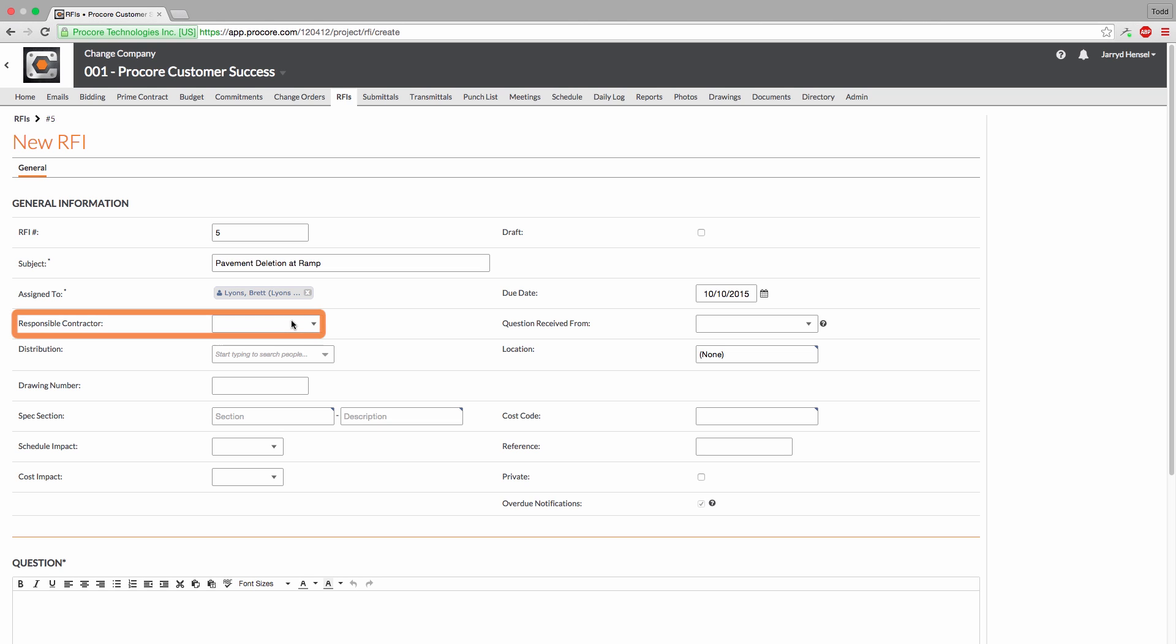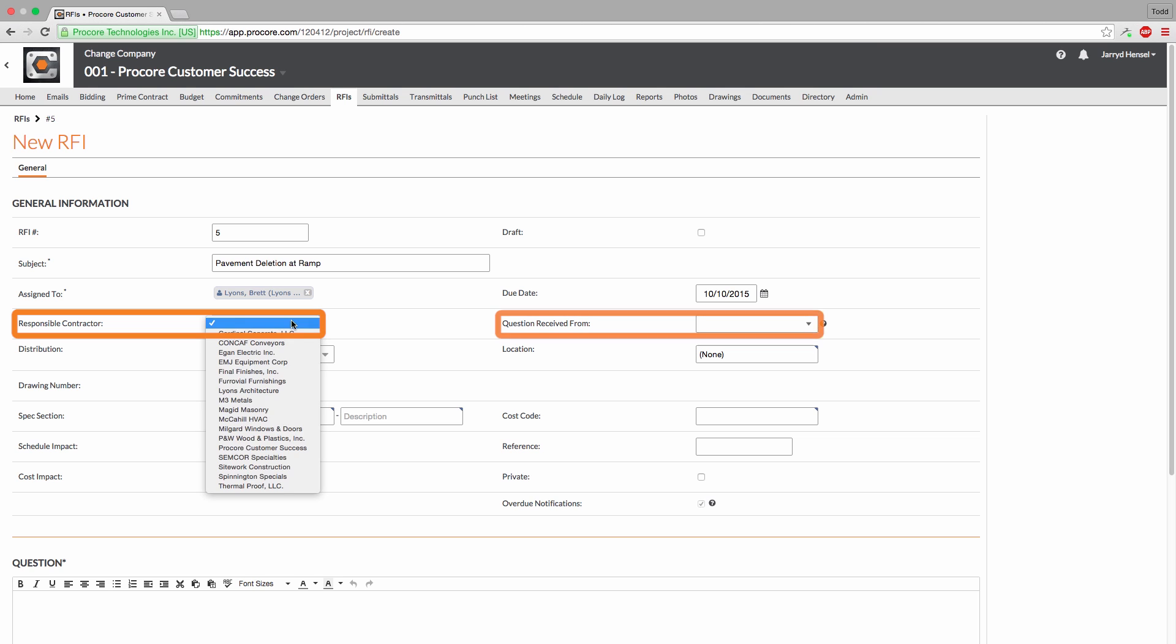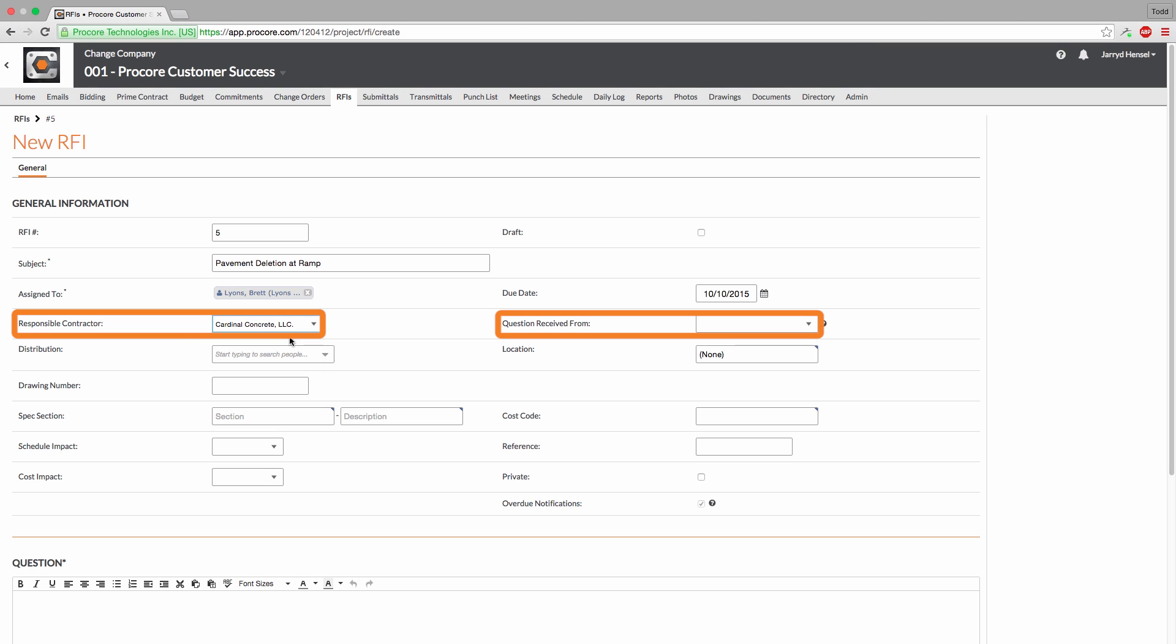The responsible contractor and question received from fields are intended to be used as a logging and reporting tool. This can either be the company and/or person that originally asked the RFI, or who needs to be notified when the RFI is answered. By filling out either or both of these fields, you're able to generate reports based on RFIs by contractor and quickly distribute an answered RFI back to the contractor. Please note, a vendor and/or person entered into either of these fields will not be copied on any of the RFI emails.